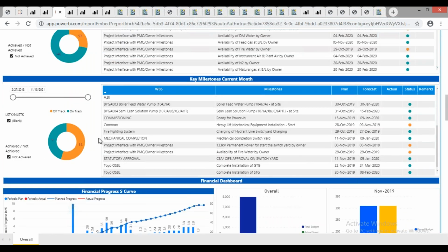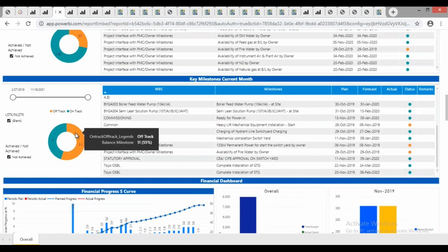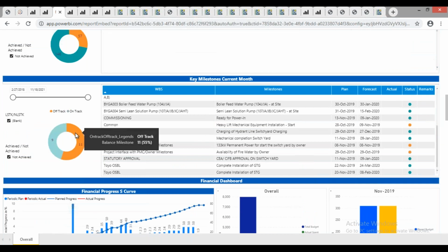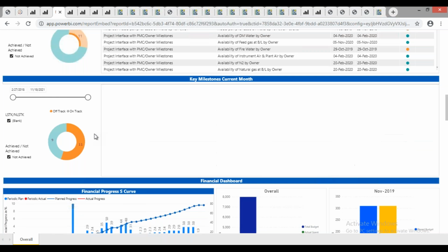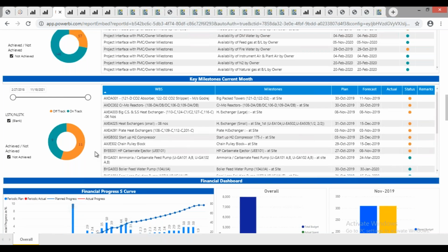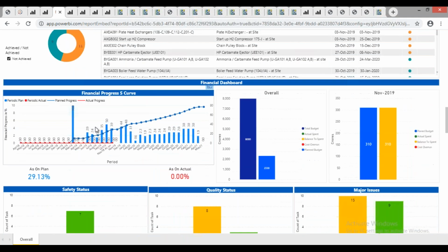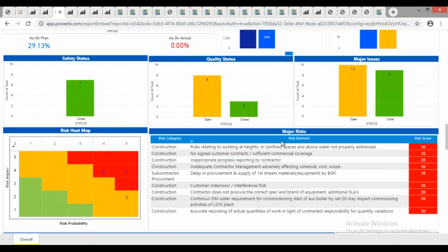And when I click on the delayed item, it will list the items which are delayed, which means it provides a very powerful dashboarding functionality, which means you manage a project by exceptions instead of managing everything. So that reduces the effort required by the project manager. So here, what happens is, because the system is integrated, each and every stakeholder is being given the activity they are supposed to do.